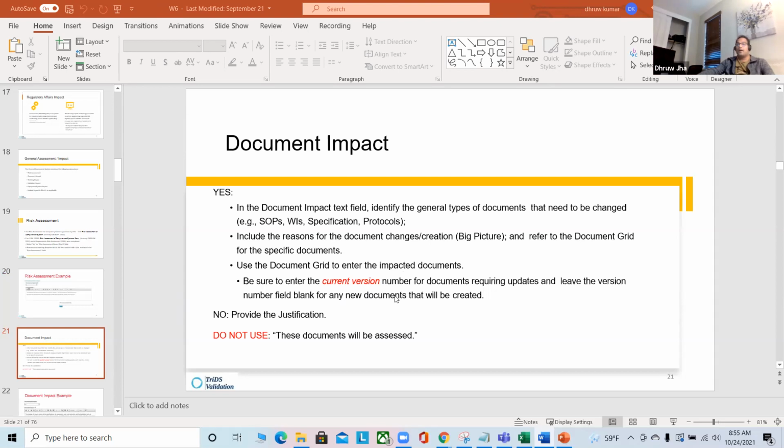when you are done with the change, what will be the new version. So if right now your URS is version 10, after this change your URS is going to be version 11. Am I right? The revision is going to change. So everything is revision control, version control. Each document is an entity. Everything is controlled. So you cannot just go and change your document.